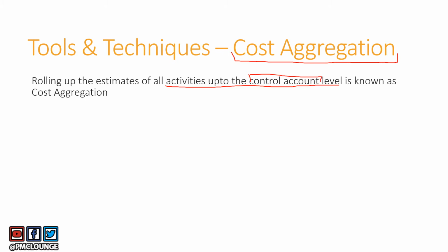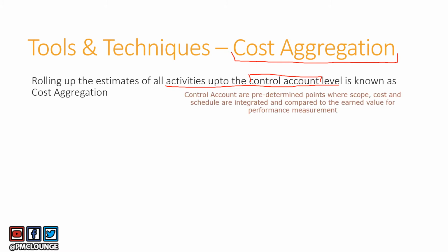Now, what is a control account? I'll share a link in the description to the video where we have already talked about control accounts. But just for a quick reference, let me remind you that control accounts are predetermined points where scope, cost, and schedule are integrated and compared to the earned value for performance measurement.